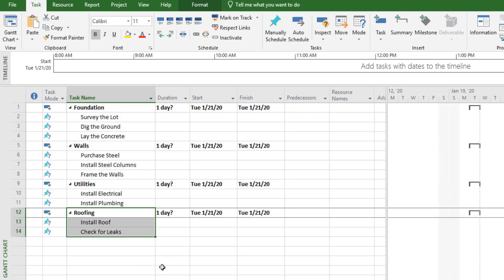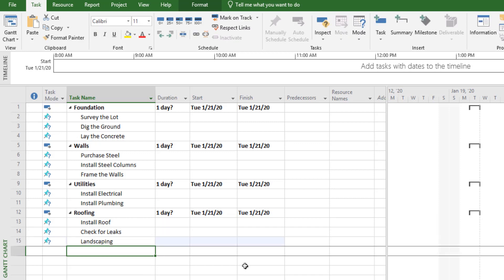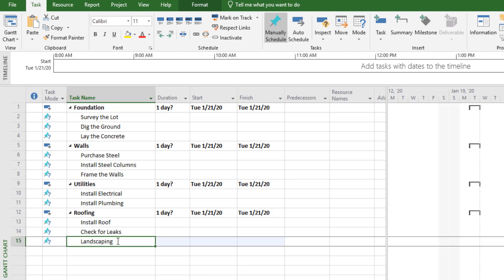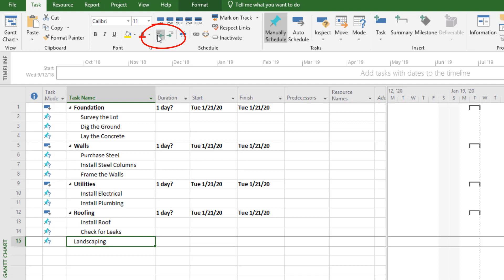Let's say we need to add some additional work, like landscaping. We'll go to the bottom and type in landscaping. You'll notice it's rolled up under roofing — we want it in its own category. So we're going to select landscaping and then out-dent that task so it's in its own section.